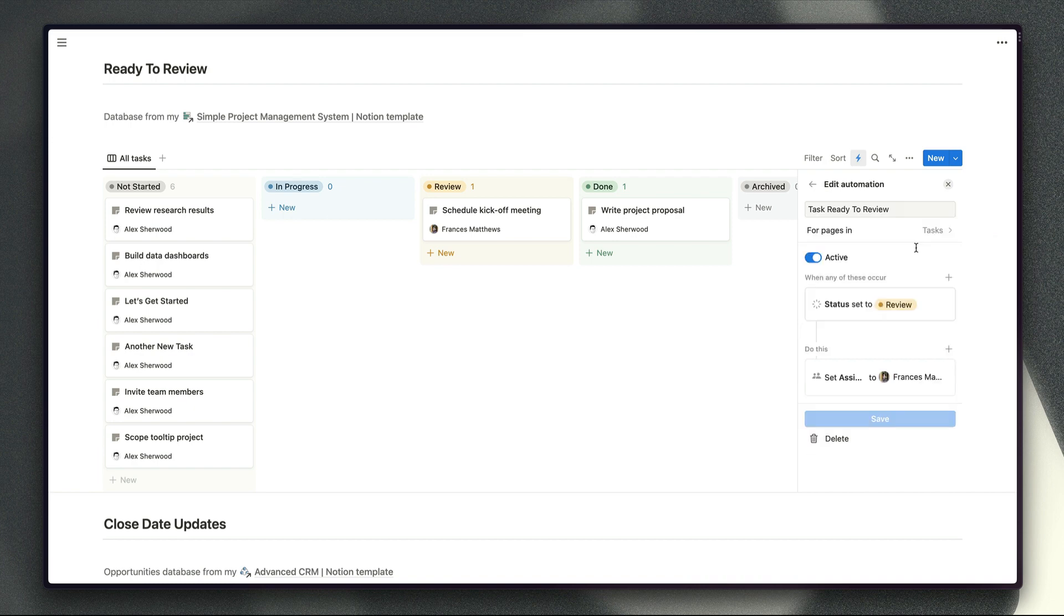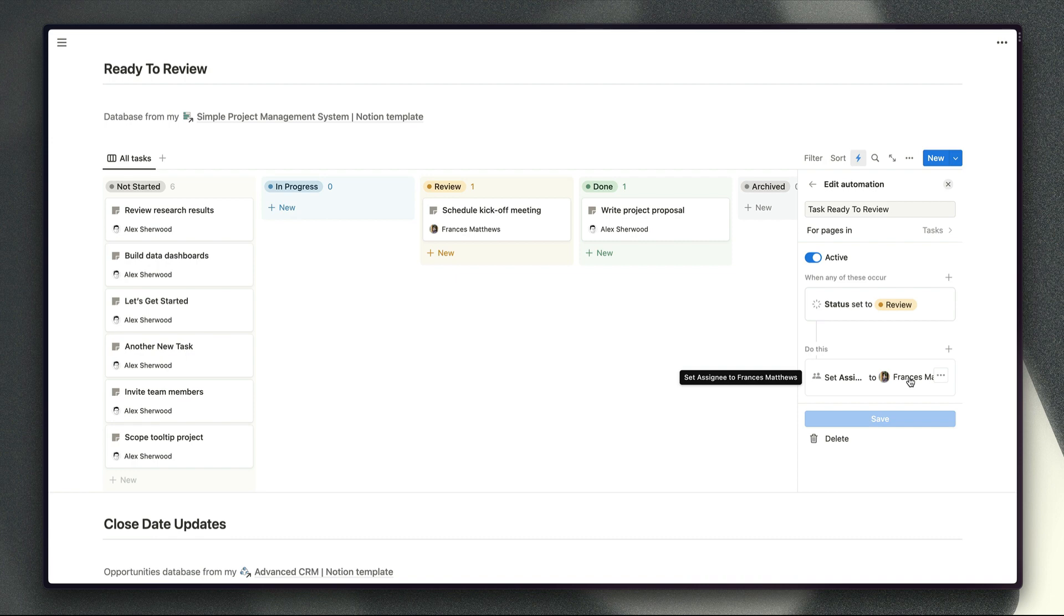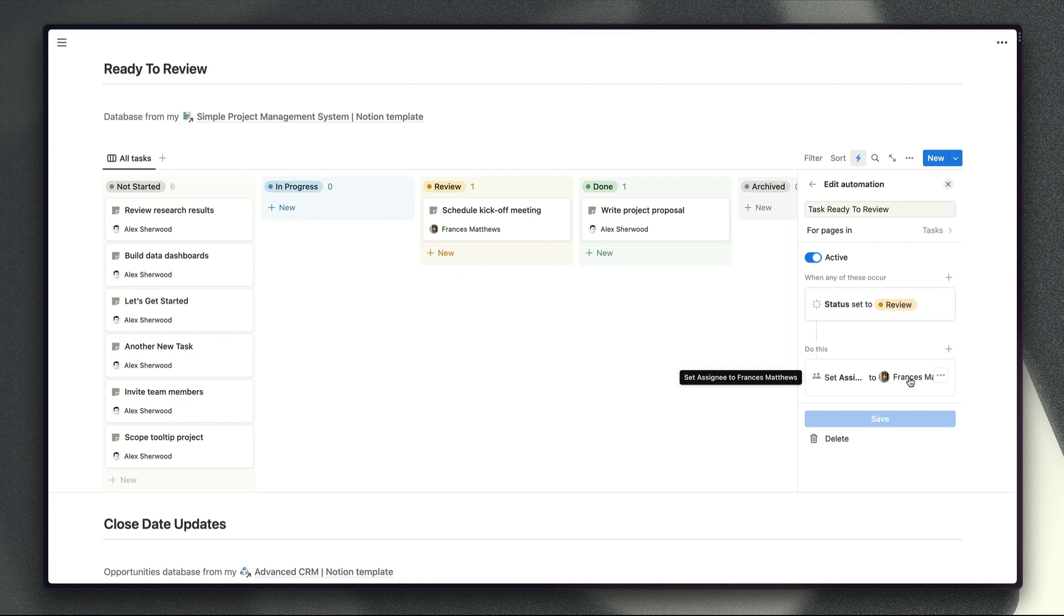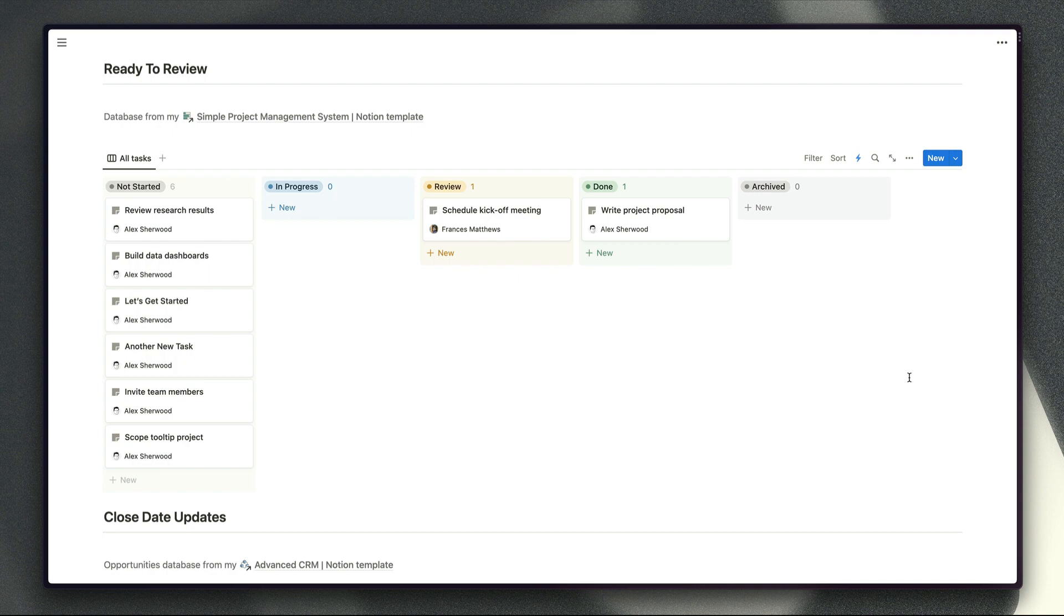So the way this automation is set up here is we're just looking for tasks that are moved into a status of review and then we're reassigning that task to Frances. Obviously as an additional step here we could send Frances a DM to let her know that that task is there in Notion if she prefers to use Slack notifications and another thing that you could potentially do here is add a couple of date properties to your task database to store the date when a task is moved into the review status and store the date when the task is moved to an approved status so that you can measure the time between those two different dates and then you can calculate how long it takes to review tasks on average.